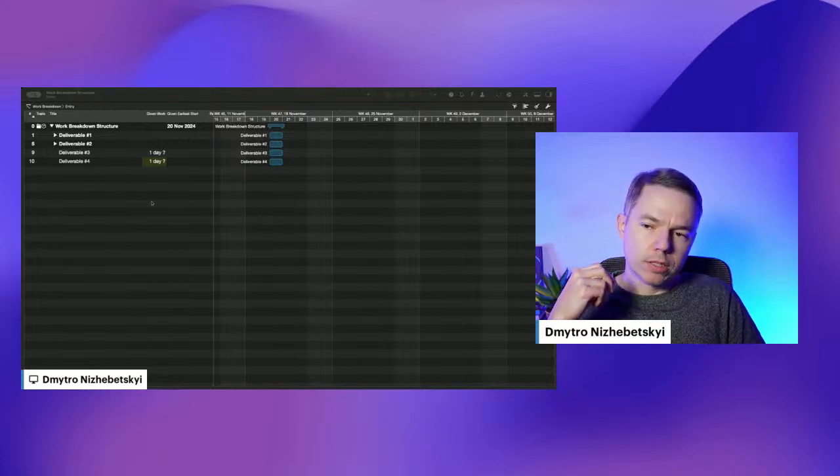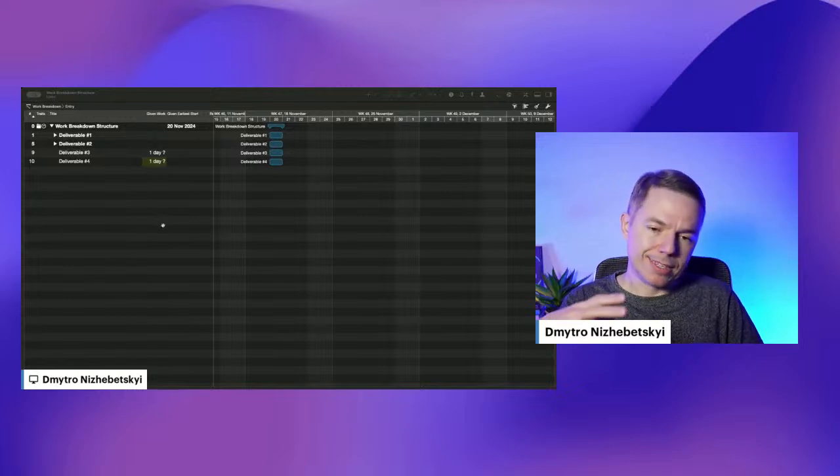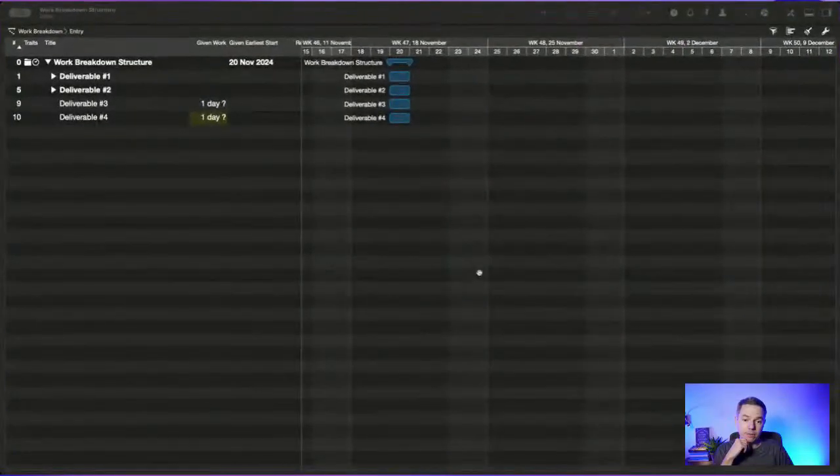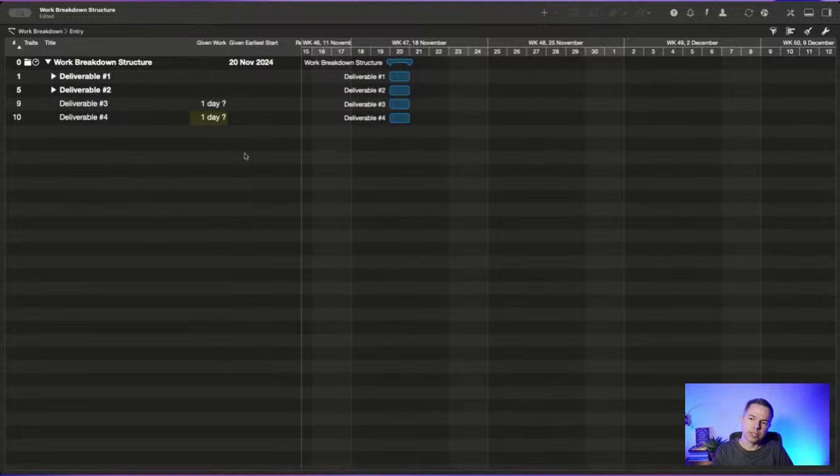That's why, and by the way, this is one of the criteria when these tools will be more successful than agile tools for development, is when you know the life cycle. And even if you don't know the requirements up front, you still can use the rolling wave planning technique, and you can define requirements on the go. The only challenge is to know those deliverables on a high level and to know approximately the whole life cycle of the project.